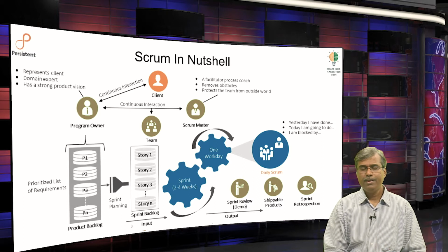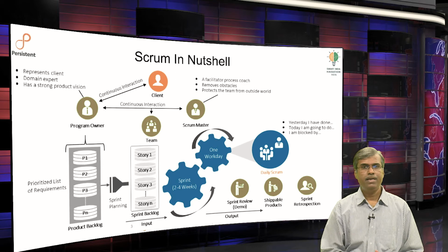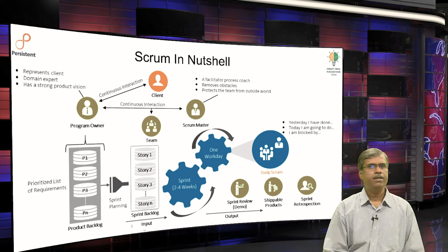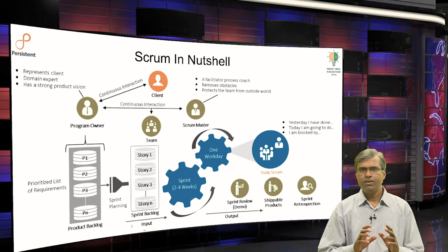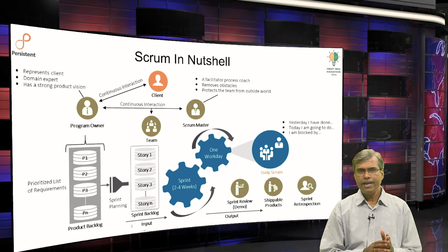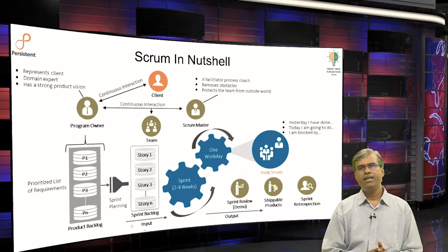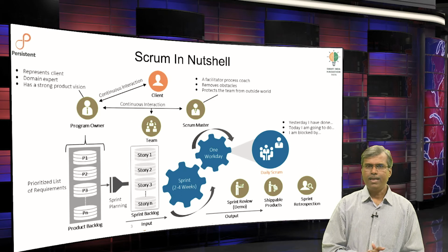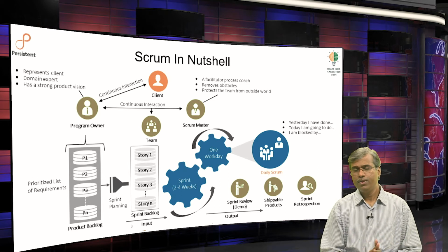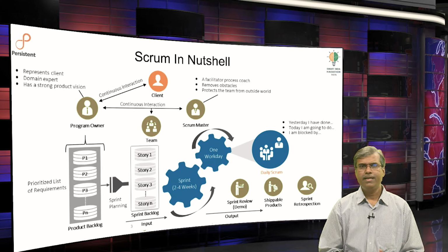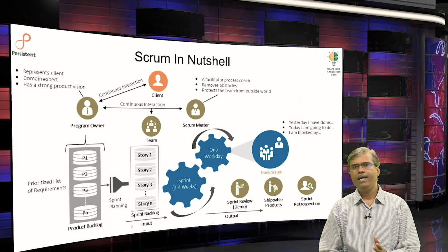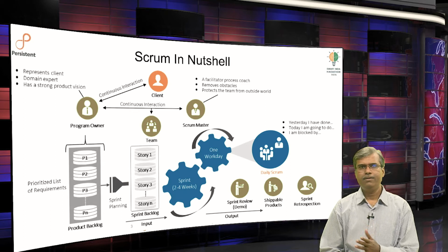As a part of the planning, another important activity that takes place is estimation. Estimation is conducted using relative sizing, which is a very simple and straightforward technique. The relative sizing works in a manner where the team has to identify and assign a number to the story which represents its size, okay? And the sizing is typically done using the Fibonacci series. You know Fibonacci series, right? So, the Fibonacci series is 0, 1, 2, 3, 5, 8 and 11 and so on and so forth.